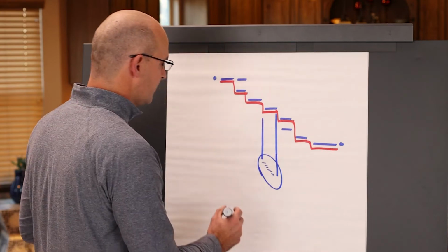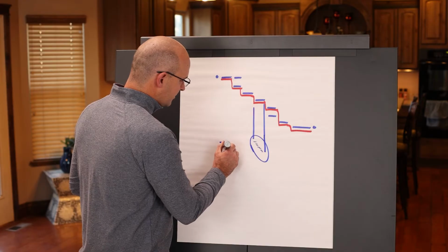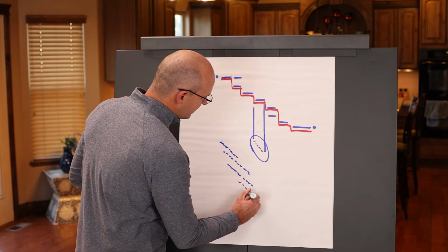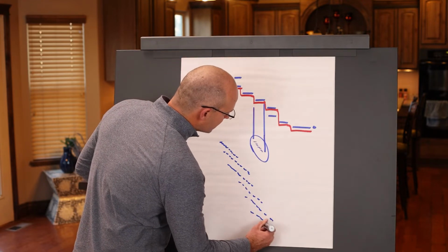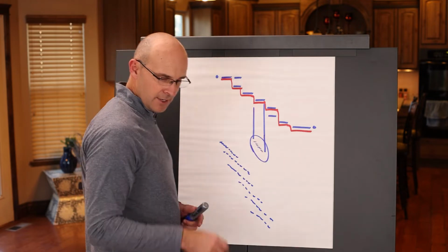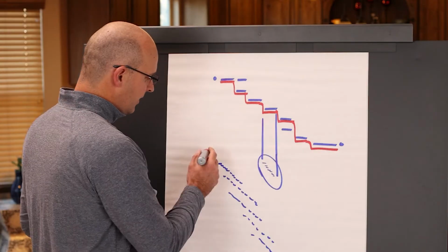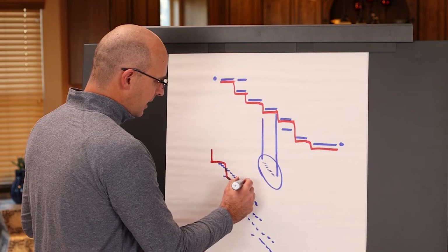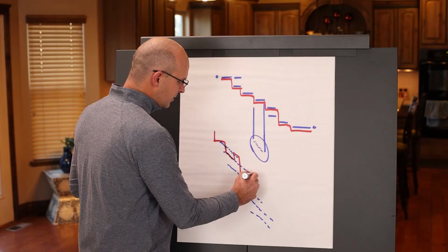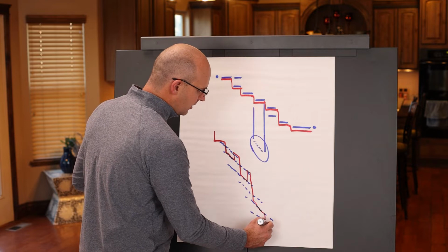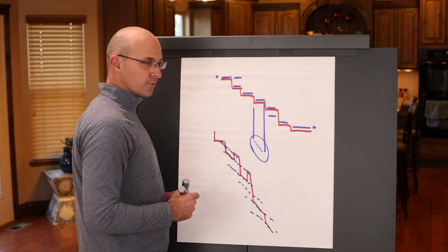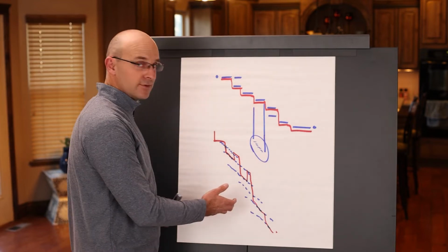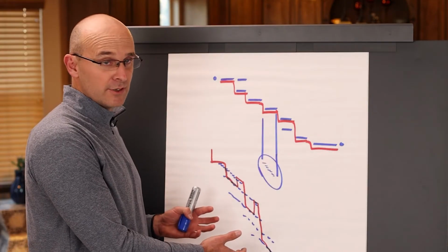Nowadays, with the invention of high-powered computers, these schedules have gotten so complex with so many different activities in the work breakdown structure that instead of running through phases, now we have the critical path being calculated in and throughout different sequences, which means that the critical path no longer represents something that's real. The critical path no longer runs through phases. It runs through activities that may or may not be interdependent.